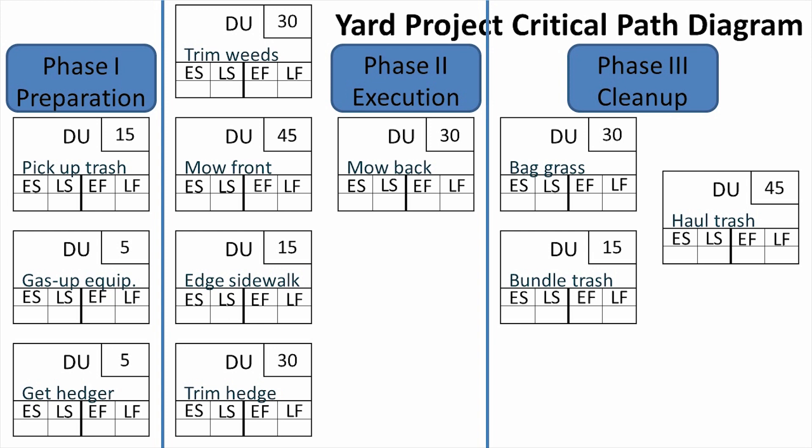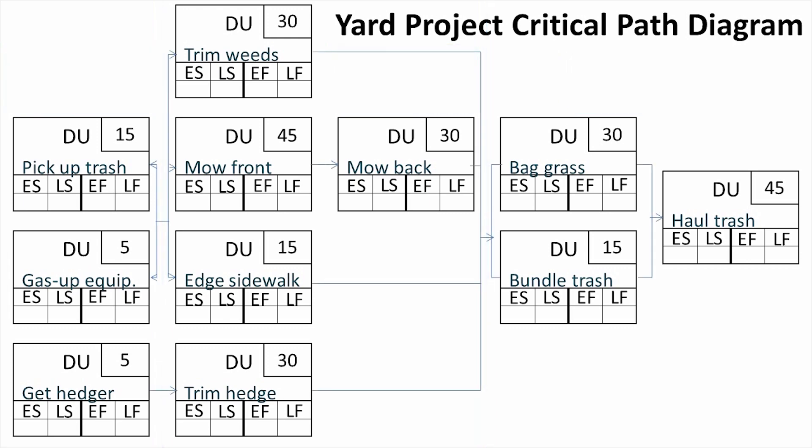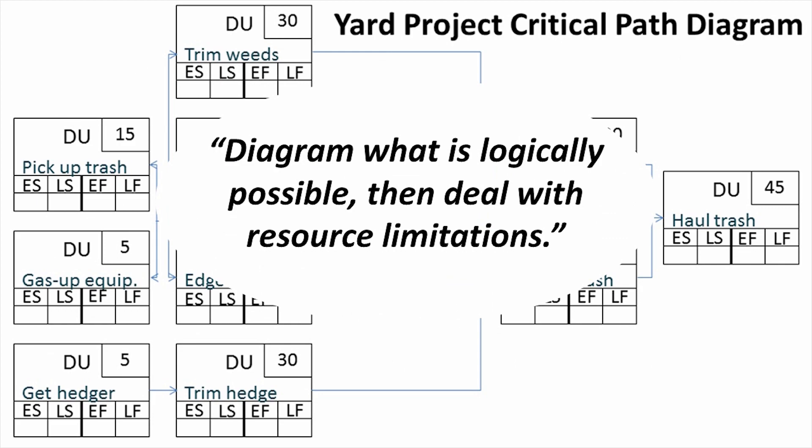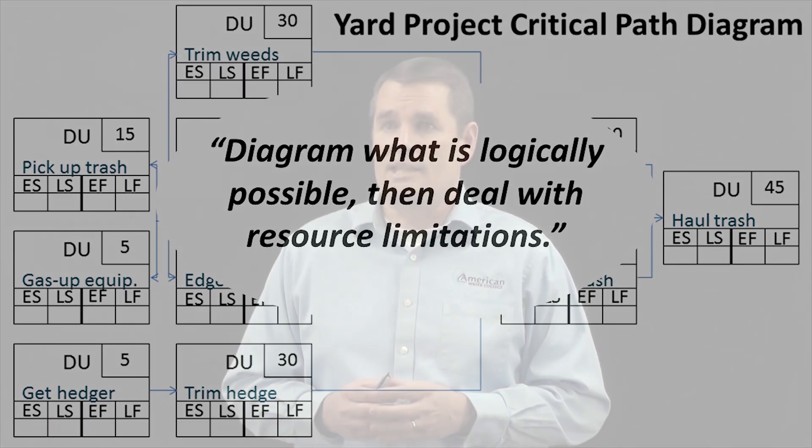The cleanup phase involves bagging the grass, bundling the trash, and hauling the trash to the dump. In putting this diagram together, I followed a rule of scheduling which says we should diagram what is logically possible and then deal with resource limitations. I scheduled this project as if I had help and wasn't working alone, because managing a project where you're the only participant isn't project management at all. So for planning your projects at work, plan them as if you have the necessary help, and then worry about resource limitations later.